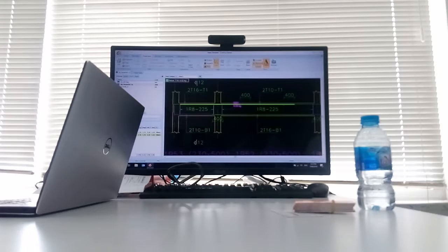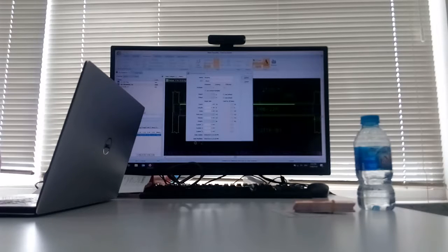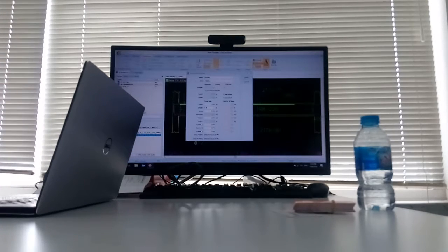In the example, the lapping is 40D. When you input the information inside this lapping, you need to use 40 multiplied by D, then key in the length column. The software will record this as your lapping, and you yourself know that this is 40 times D.